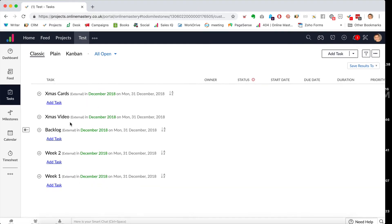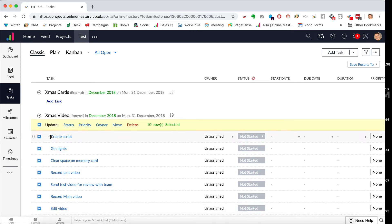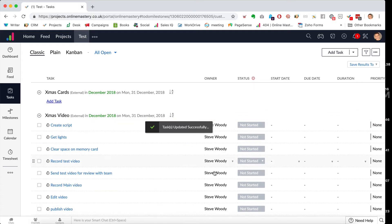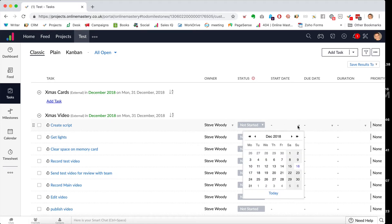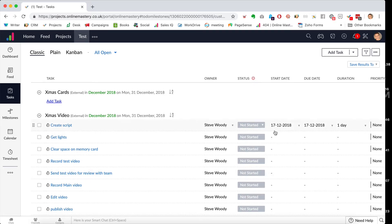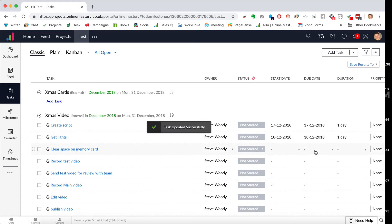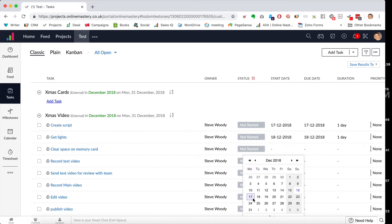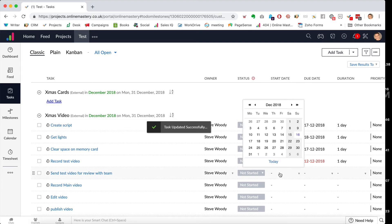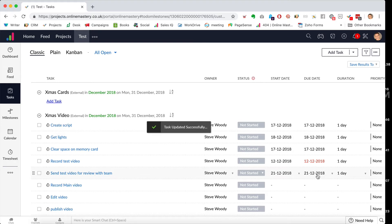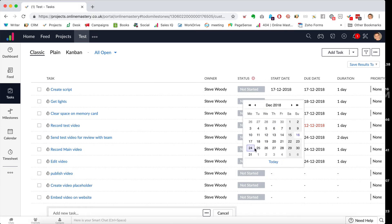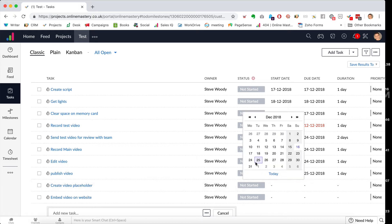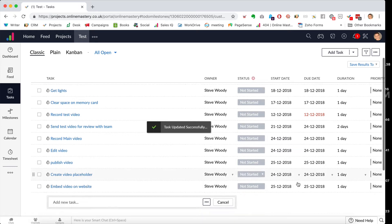I can select all of those tasks, set the owner to myself, and assign start dates and durations. The script starts tomorrow, getting the lights can't happen until Tuesday, clearing the memory card can be done tomorrow, record the test video on Wednesday, send it to the team by the 21st, record the main video on the 24th, edit and publish on the 24th and 25th respectively. It's a bit tight, but it gives you the idea.